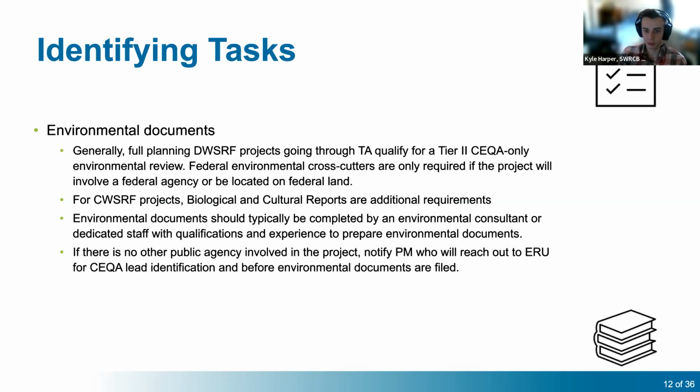Also, for environmental documents, it's important to keep in mind that they should typically be completed by an environmental consultant or dedicated staff with qualifications and experience to prepare environmental documents. Also, if there's no other public agency involved in the project, please notify the project manager who will reach out to the environmental review unit or ERU for the CEQA lead identification. And I just want to point out, we're just briefly going over environmental documents, but we will be holding another training in the future that will focus on environmental documents. So just keep that in mind too.